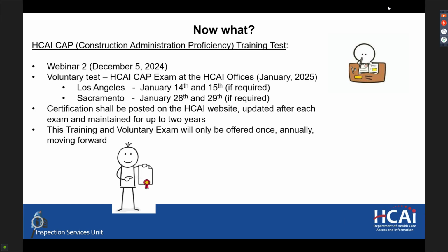So, for example, Darren concurs to NMA, let's say number one, today on November 7th. You will update your log for that specific NMA 1, that on November 7th, Darren concurred to the NMA. And like this, you will have your updated log. Thank you, Darren. To further that point, if I don't concur with it and I don't address it in any manner, you can put in the date December 6th, or whatever 30 days is from today, and say date of automatic acceptance.